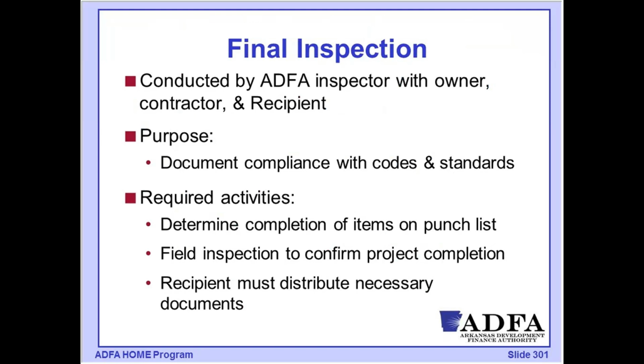It's to make sure that all of those codes and standards have been completed, to verify that this property now meets standards. That also includes any punch list items that had previously been identified; those have to be completed before we can call this a final inspection and say the project is done. So this is ADFA's on-site check that we have project completion.